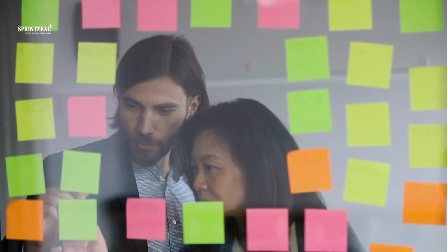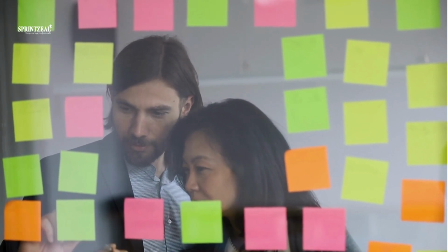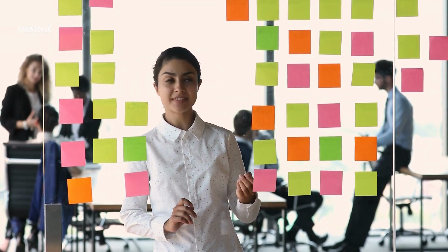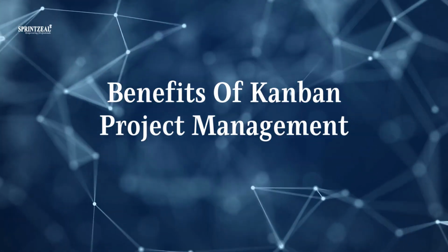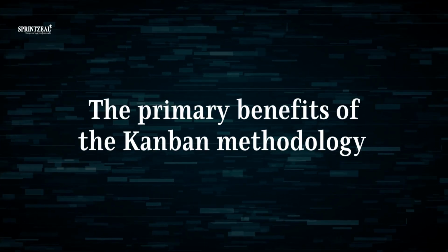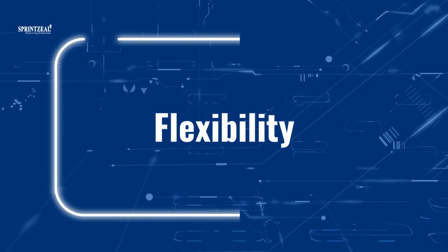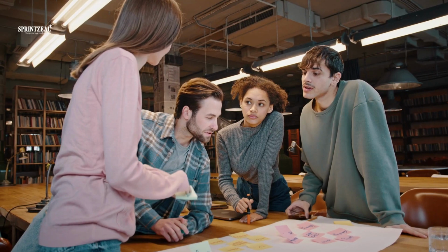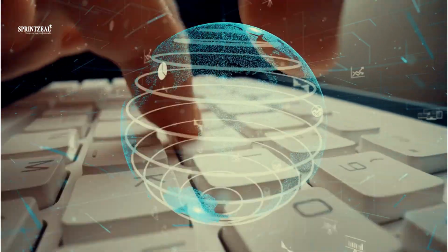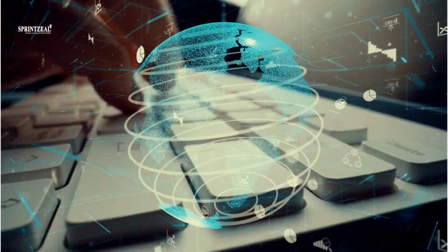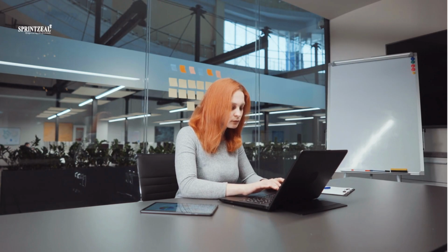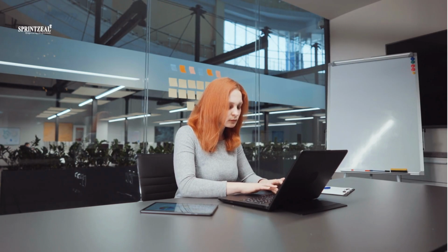The next section talks about the benefits that organizations will receive from implementing Kanban methodology. Benefits of Kanban project management. The primary benefits of the Kanban methodology are: flexibility. Kanban doesn't dictate which work occurs when, simply how many tasks are allowed in each phase at once. This approach makes it incredibly easy to reshuffle work as priorities change.